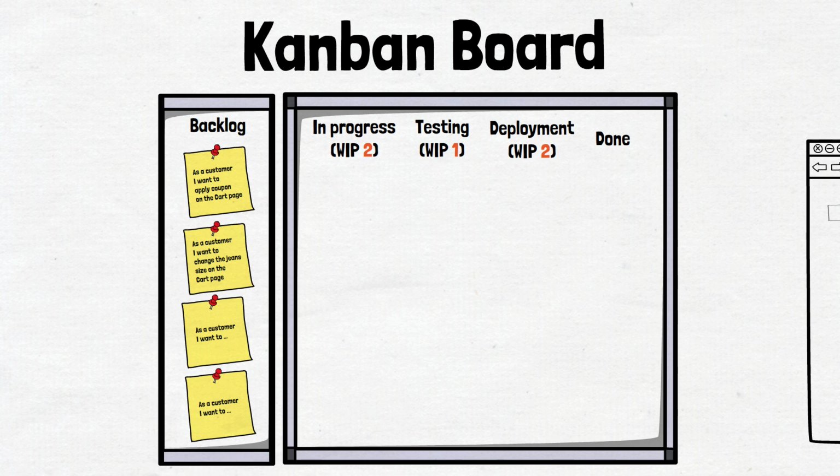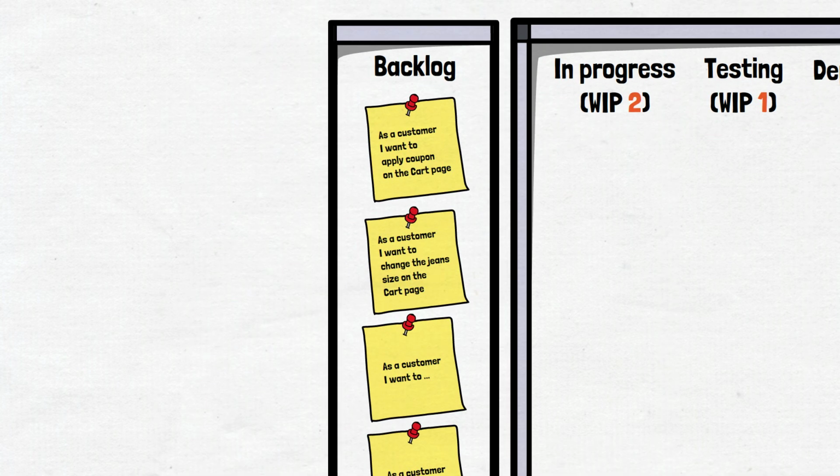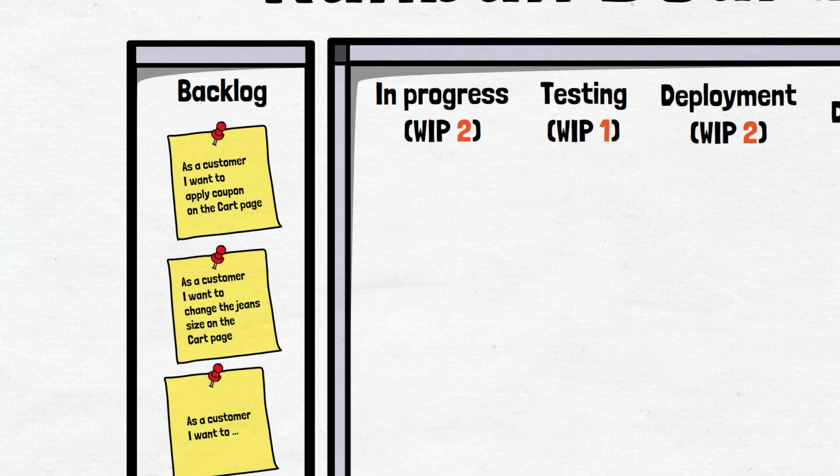Kanban is a continuous process. It has no iterations. Accordingly, there is no velocity and story points are not required. Of course, the estimation process is present, but it affects the priority of the tickets rather than the planning of the increment. Stories are sorted according to priority in the backlog column. At the very top is the most important story. It is already groomed and ready for development.